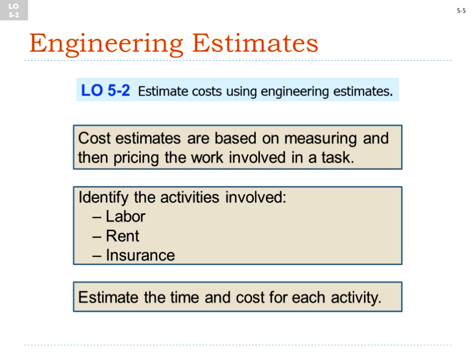So one thing about engineering estimates is that it could possibly be based on prior experience. If you're a house builder and you've built a few houses, you might come up with your engineering estimates based on those past amounts. For example, if you know that you have a certain number of plumbers or electricians or administrative support, secretaries, whatever the costs are, you already have experience from prior houses that you built, so you're going to base your estimates on those past amounts.